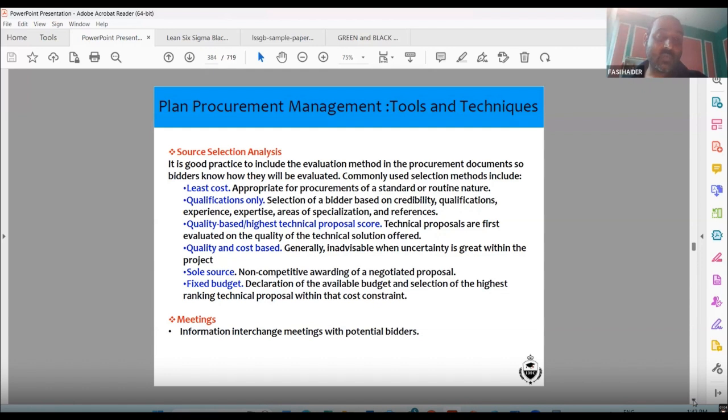It is written. We want that you should remove the soil. Then you should do the compression. The compression should be of this value. You should lay the pebbles of this quality. You should put the railway line of this particular specification. You should make sure that there are no cracks. So all the specifications are clearly defined. Based upon that, you put a cost.